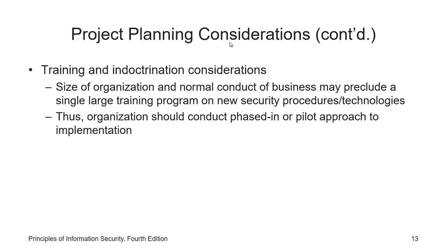The training consideration depends on the size of the organization and the number of people that will be involved in the implementation of the project or the security procedure. The organization should maybe conduct a phase-in or pilot approach to implementation to make sure that they have the proper training for the users. In case you have a larger organization, it will be very hard to train the whole organization at one time. Based on that, you can just take divisions and start the training in those divisions, and then move on to the next division and so on.